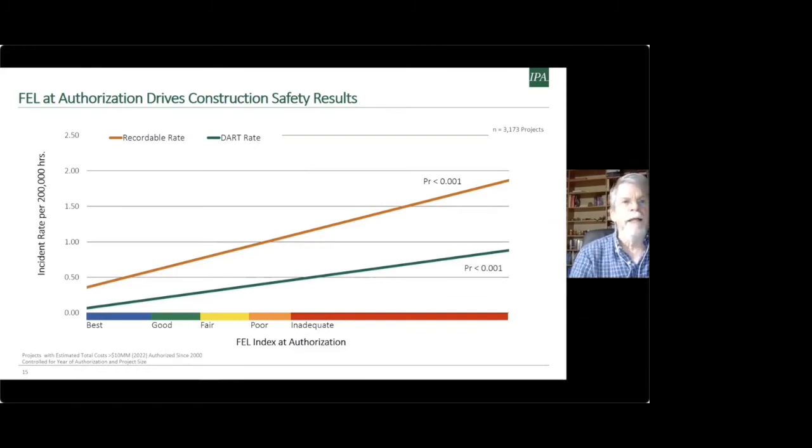So here on this chart, you can see there's a line that shows this relationship for the recordable incident rate on the top in orange, and another line showing the statistical relationship for the DART incident rate. And obviously those two incident rates are very strongly correlated because of the way they are actually overlapping to some extent. But the point of this graph is that the relationship between the level of definition and authorization of capital projects and its ultimate safety performance, which may not even begin construction for a year or two years after it's authorized, depending on the size of the project, there still is a very strong and significant relationship between definition and ultimately construction safety. So right there, we have a best practice related to capital projects that has a significant and strong direct correlation with better construction safety.